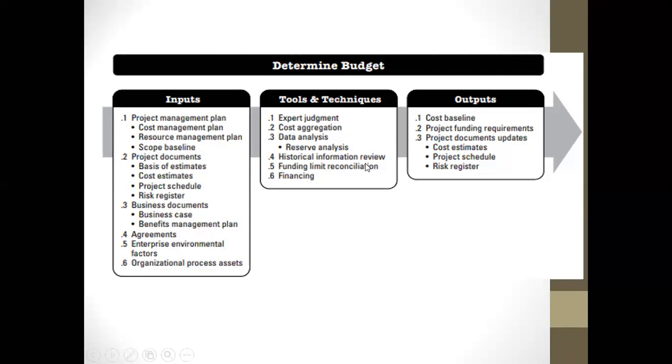Remember, one of the new trends in project management is knowledge. One of the trends in project cost management is knowledge management. Does the organization have a database where there could be retrieval of former projects done, so that we can look at the information and from that we can make assertions and assumptions, right? So one of the tools we use in that knowledge management is what we call the historical information review. So if you have documentation of the previous projects that have been done, it's easy to pull it up and say, okay, this is how it's been done.